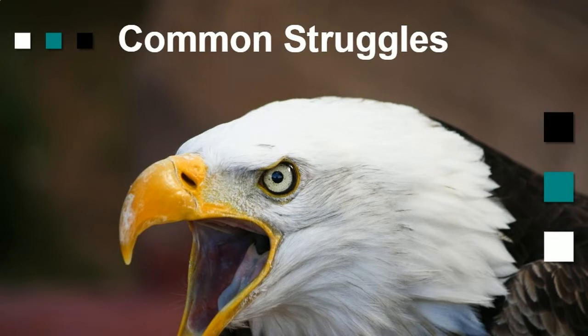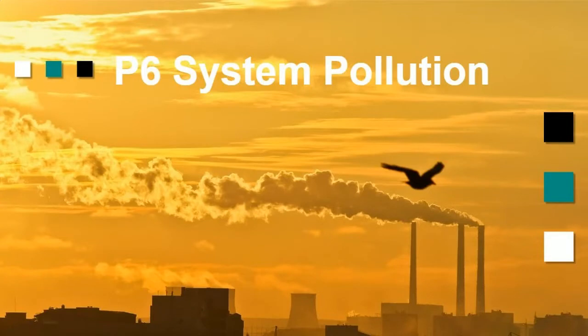And we need to bring them into our P6 environment. Now, if you've been in that situation, you know that you may receive data elements that you don't want in your P6. So it starts to do what we call polluting the database. That can become a big problem, especially if you have any collisions in those imports.